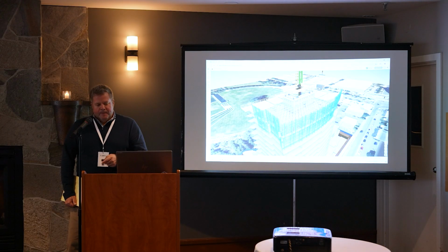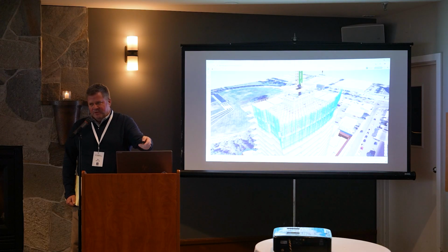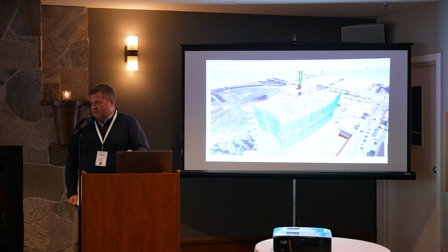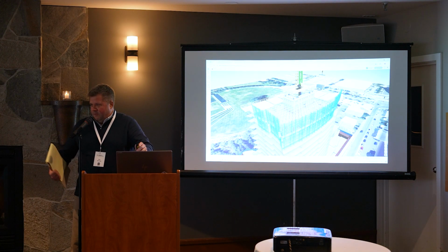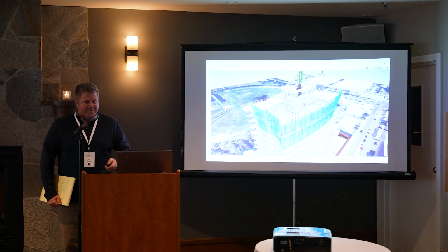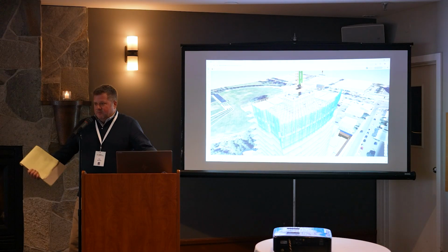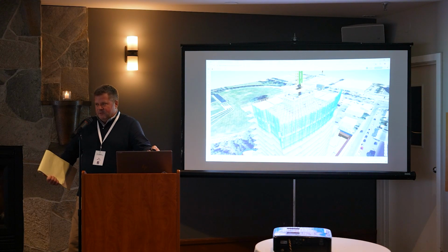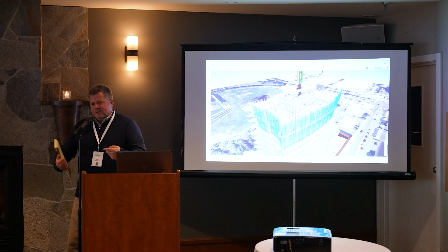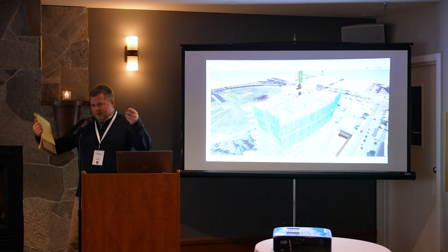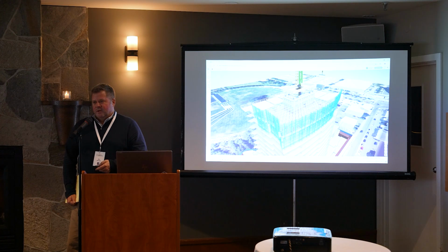Definitely. One thing I didn't say on this slide is we have used it with KPFF or CPL to optimize the use of these table systems. It's got to be designed right. In a perfect world, we would build only square concrete boxes where the columns line up and down in every corner. We don't invite architects to those meetings. But having this visual in a meeting with the architect and structural engineer and saying, you do have some leeway. You can waive the balconies with this system 6 and 8 feet out, like we did with that Avenue Bellevue job, which is one of these. Being able to facilitate those conversations with the architect and engineer of, you can do this, but you can't do this if you want this kind of efficiency, I think was a benefit to our general contractor design teams.